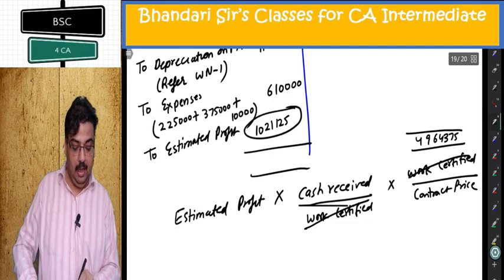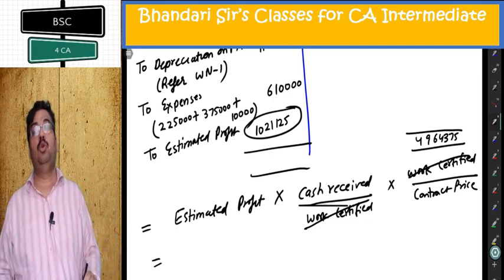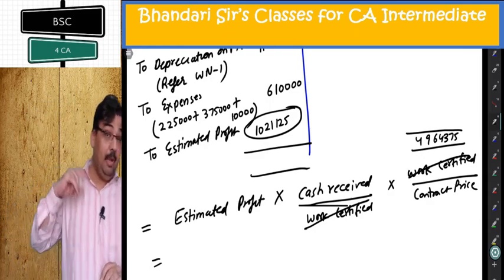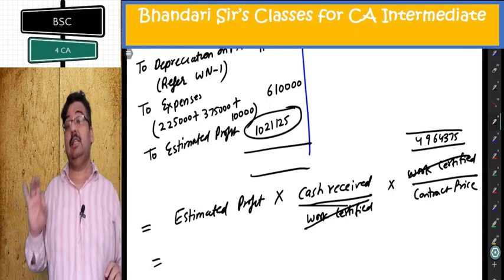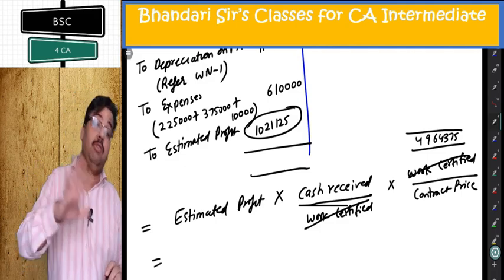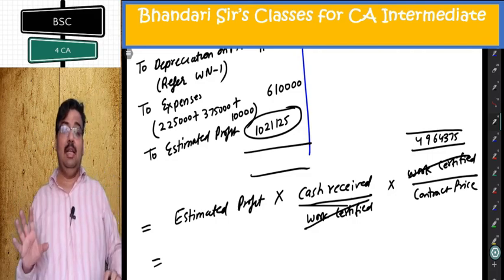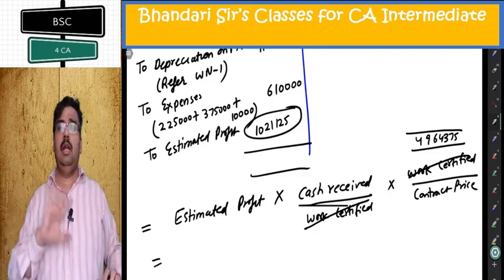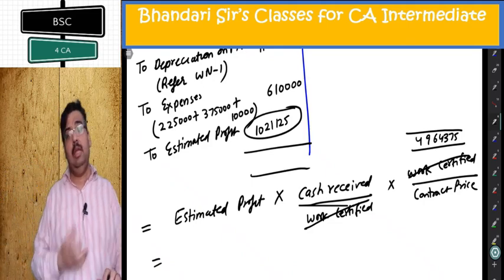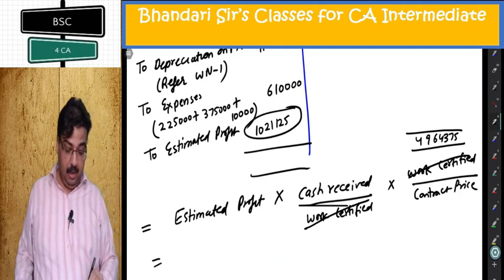He wants you to apply the best formula that you have done in the fourth rule. Now, is the fourth rule applicable or not? Don't look at rule for applicability, because question is saying it is the matter of policy of the company to apply this formula. So, we have to apply this formula even if contract is 20% complete. Whatever stage of completion, I don't mind. This policy of company goes over and above our rules. The policy is given, I am applying the same.